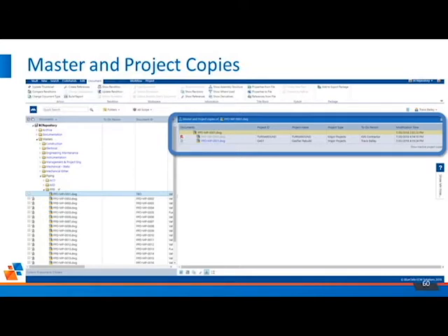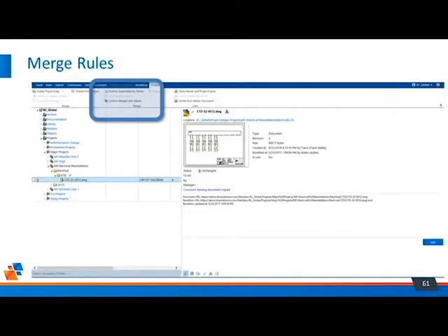Meridian introduces notifications in this process so that folks in one project will be notified when another project team releases a new copy, and introduces safety checks so that when the project copy is ready to be released, they'll have to merge the geometry first, so no work is lost. When documents are assigned to multiple projects, essentially concurrent engineering, Meridian will require that the released project copies are either merged with the as-built version or marked as superseded. I'll now give a quick demonstration of this process.